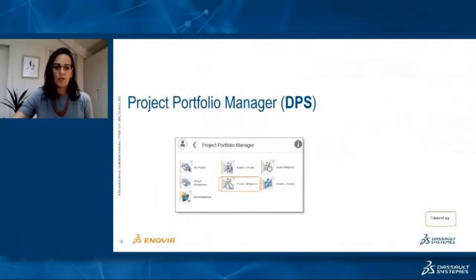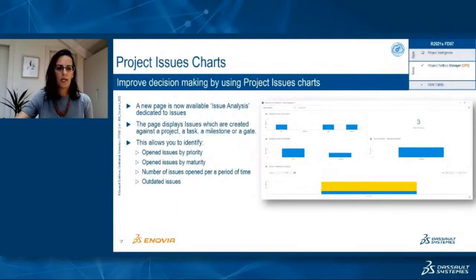Project Portfolio Manager is a role available on-premise and on cloud, but all enhancements in this FD are only on cloud. The first one, there is a new page that is available, Issue Analysis, dedicated to issues related to projects. Only issues created against a project, a task, a milestone, or a gate are taken into account.